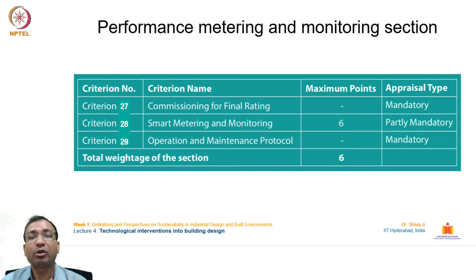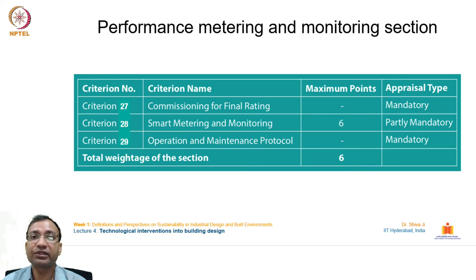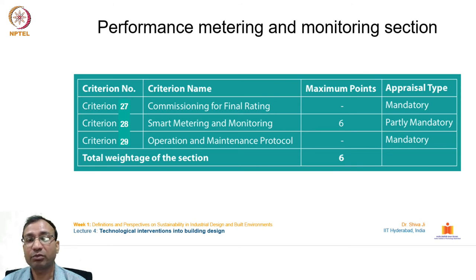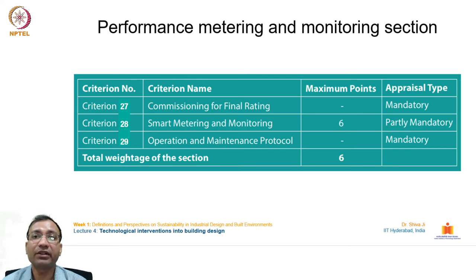The performance metering and monitoring section is dedicated to evaluating and monitoring building performance over time — tracking energy and resource consumption. It has three criteria: commissioning for final rating, smart metering and monitoring (6 points), and operation and maintenance protocol. Smart metering enables constant monitoring so that high consumption or leakages can be detected and rectified promptly.